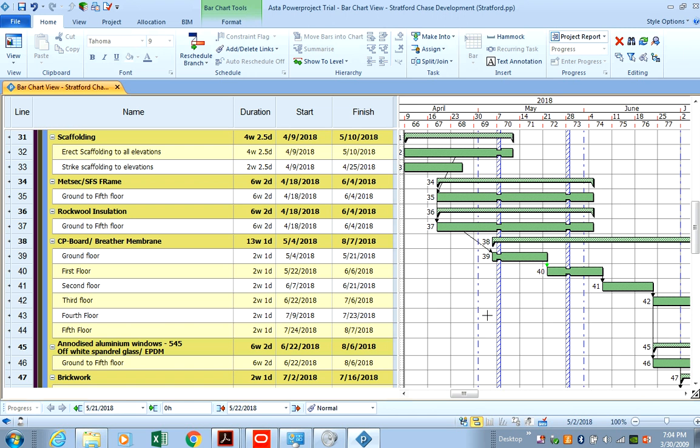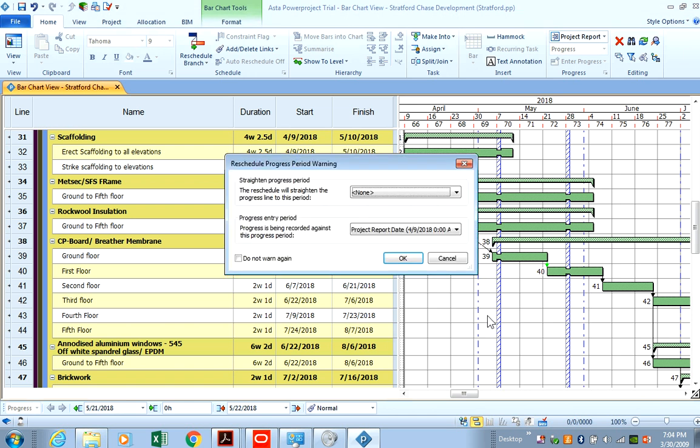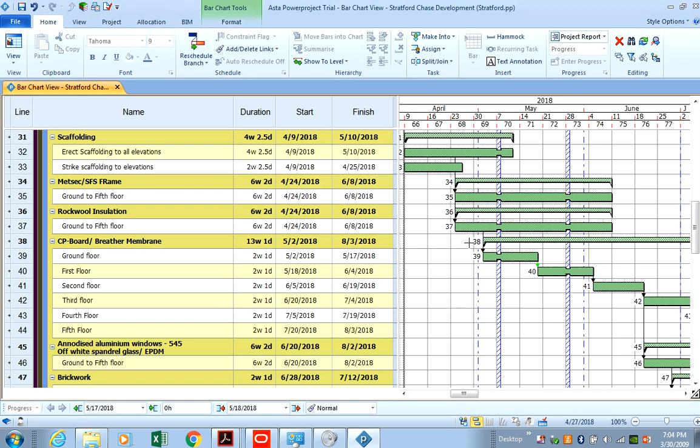Okay, and that's literally how it runs. Just to see what that looks like, you schedule it so it does the calculations for you, and it arranges the activities based on the logic we have put in there. Now if you look at this activity, rock wall installation, ground floor to 5th floor, we said we wanted it to start to start 6 days later with ground floor.